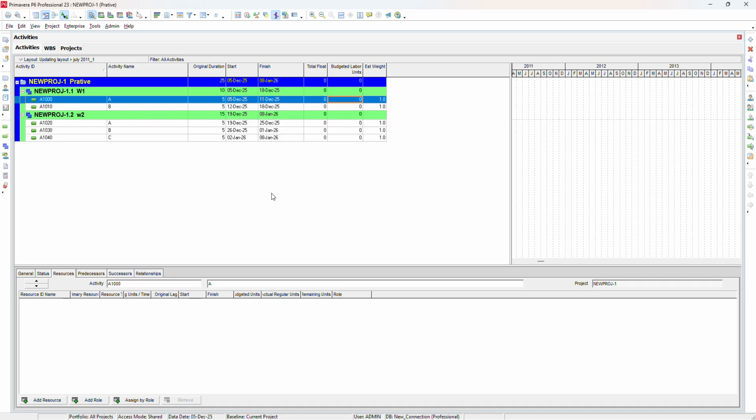activities and WBS level. If you think that in the WBS level, 10% of the activities can complete it, then we can put 10% in the first activities, first WBS level. In the second WBS level, almost 50% of activities might be required. In the third level, 30% of labor are required for that one. So based on the estimation weight, it can provide the budgeted unit for the activities.